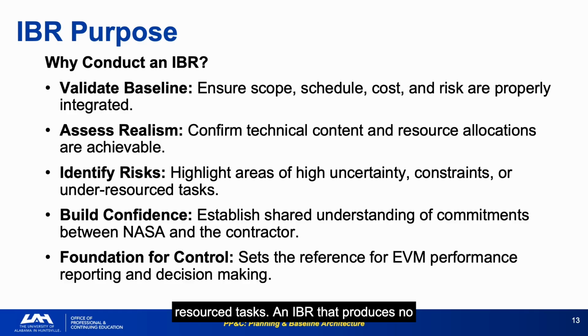An IBR that produces no action items is either a sign of a perfect baseline or an incomplete review. Real programs have issues. The IBR should find them. Foundation for control is the lasting outcome. The PMB validated at the IBR becomes the reference baseline for every variance analysis, every EAC, and every corrective action for the life of the program.